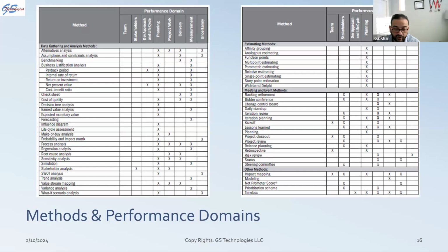Now, before that, for the project planning, how much time do I need? I would need maybe another 2 months to do the project planning, which means that by the end of July, my planning has to be completed in order for me to start the construction. Which means what? Now we started 2 months behind, reverse 2 more months over there, and then go back 2 months from July is what date?